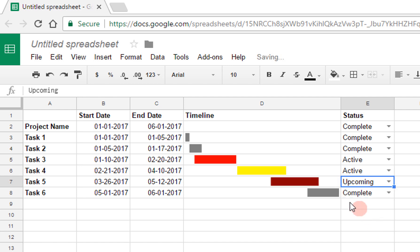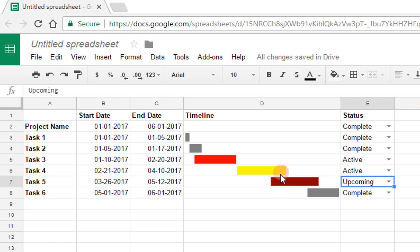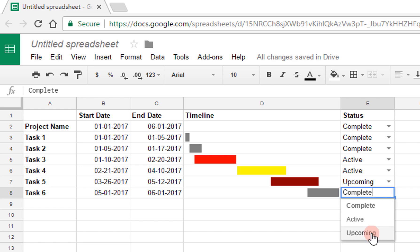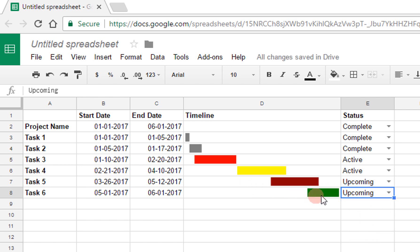And let's say this one is upcoming. Well, we're already within this window, it's March 29th, past March 26th, and therefore it's going to be dark red, because this is still upcoming. And finally, this one, let's make it upcoming, and it's going to be green, because we're not within that window yet, and that task has yet to come. So this does exactly what I expected it to do. Again, you can modify those colors based on the methodology that I just presented.